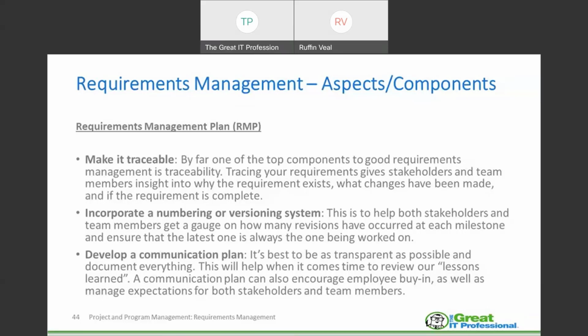Trace that requirement. If that requirement changes or is added, you've originally put together that traceability aspect of your requirements management documentation. You want to make sure that that new element, that upgraded element that you're looking at, is traceable. You want to go through the traceability process. Why do you want to do that? You want to make sure that you don't introduce any new risk.